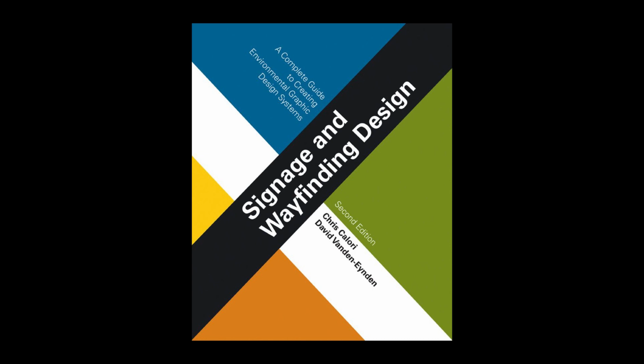It's more efficient for the sign fabricator, rather than the designer, to produce the final digital artwork for each individual sign unit in a program. So digital art production is typically the fabricator's responsibility, but it's the EG designer who controls the visual appearance of the artwork by providing graphic layout drawings.